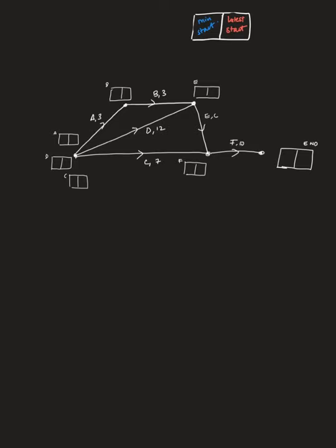All right, so to start activity A, D and C, they have no immediate predecessors, so they're all going to start with 0. And I'm going to do the first part of the box in blue to indicate my minimum start time or my earliest start time, and the red in the second box to indicate my latest start time. Okay, so A, D and C all start at 0.